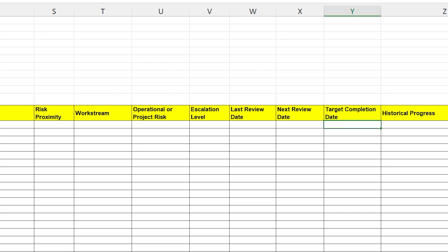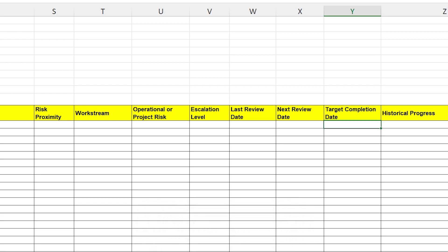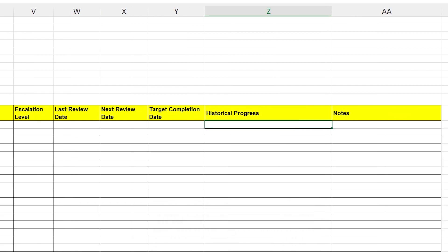Target completion date is another one that sometimes catches project managers out. It's the date you expect the risk to have been fully managed. So put a date in there when you think the risk will be managed, but then go back and have a look at your mitigation actions and see if this date is consistent with the last activity that takes place in that plan. Historical progress is a useful overflow section for if you've made so many progress updates against your mitigating plan. You might want to just copy and paste some of the older progress updates into here and then hide this just so it doesn't end up distorting the whole sheet.